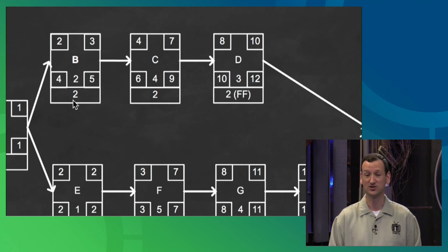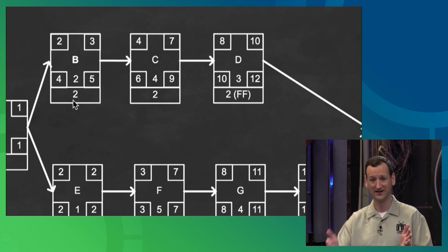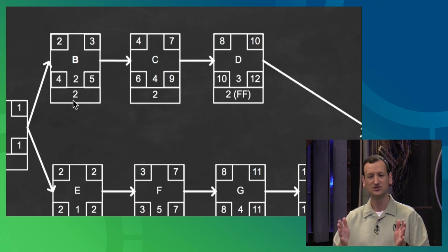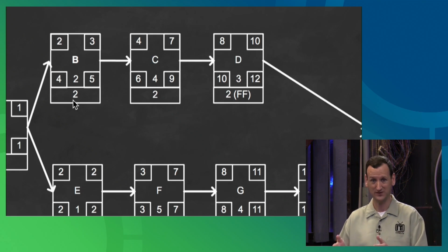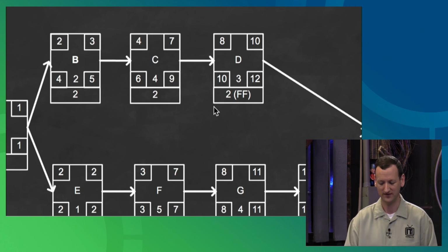So on the exam, they may ask you to locate free float. Which of the following tasks has free float? And now you've got to calculate it out. You've got to figure out your early start and late start and your early finish and late finish so that you can spot where the gaps are in between the tasks, and that's where your free float is. And if you've got no gaps, you've got no free float. You may not, right? So it's important to note that.